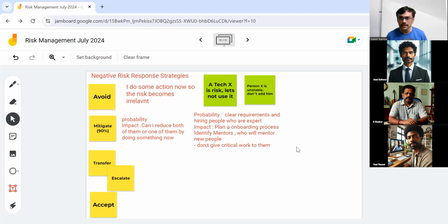That could mitigate possible conflicts and possible poor team bonding in future, because people are working remotely, people are working from the US, people are working from the office. We can say 1 week of co-location we are providing. We are spending money for that to mitigate the future conflicts and future team bonding. That could be a mitigation activity we can do.